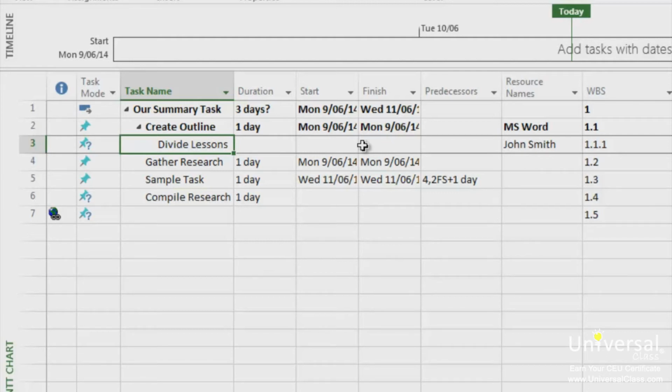For example, the task is to paint the office. You've listed a 2-day duration. However, you hire 2 painters to paint the office. These 2 painters are listed as 2 different resources on your resource sheet in Project 2013. Having 2 painters reduces the duration of the project to 1 day. They will get 2 days of work completed in just 1 day.